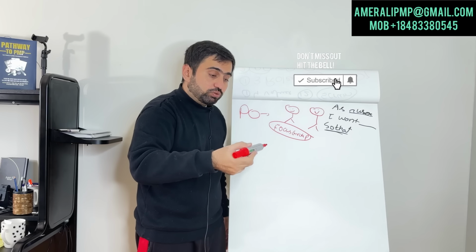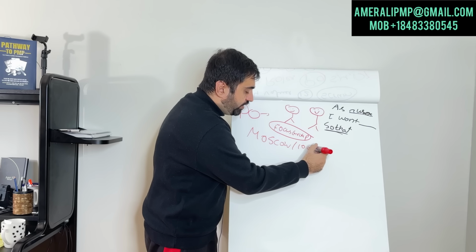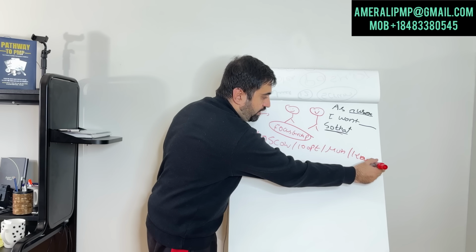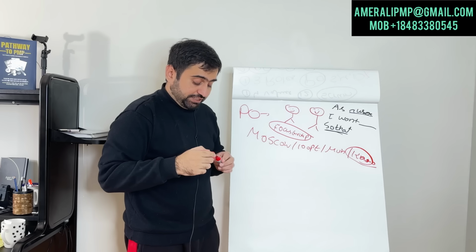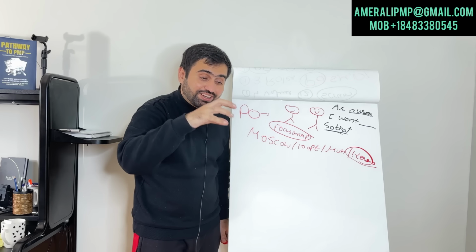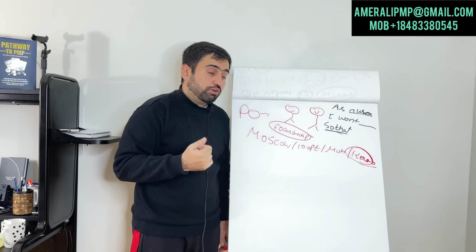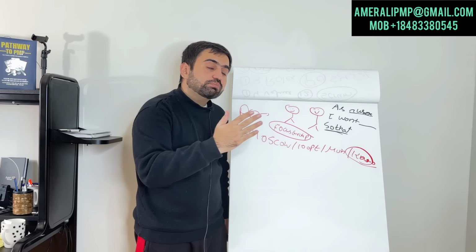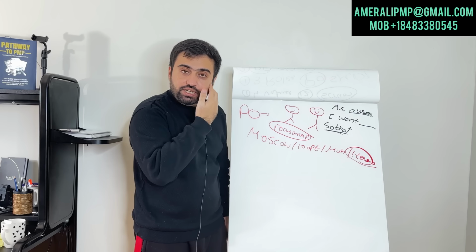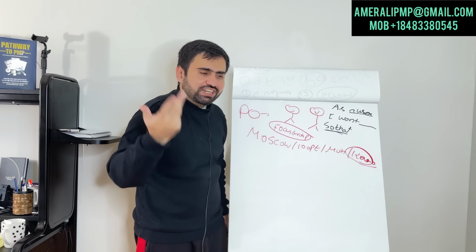Now he goes back to them and asks them to use MoSCoW, 100 point, Monopoly, even the Kano model. He uses any of these techniques. He is asking them, okay, in MoSCoW, what are the most important requirements for you right now, right? If you get a salary, today is 1st of February, what is the most important thing for you? That is your must requirement. What is the should requirement? Okay, the must things are done, that has to be done. What is the next thing? What is the must have, should have, could have, would like to have, but maybe next time.